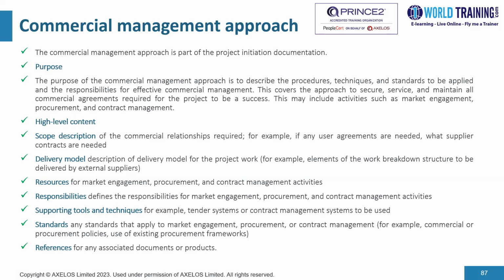used. There would be a heading on standards, any standards that apply to market engagement, procurement, or contract management. For example, commercial or procurement policies, the use of existing procurement frameworks, etc. And then there would be a section on references for any associated documents or products.